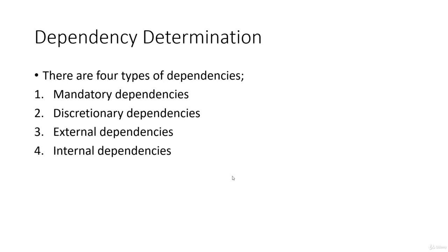And then we have external dependencies. External dependencies are external requirements. Let's say we need to deploy our system on a server, the database and our website, in order to begin testing, deployment and coding. But hosting is managed by an external team. So in that case, we are dependent on them. In case of construction, let's say you have a vendor who is supplying you raw material and you are dependent on them.